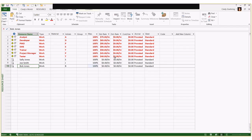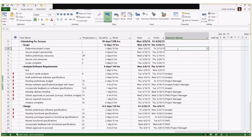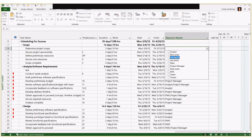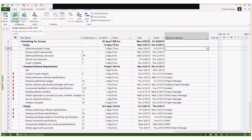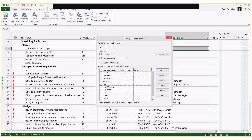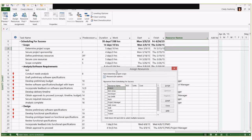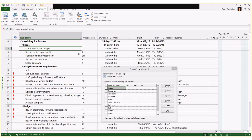You can track cost rates and even different calendars for your resources if needed. Once resources are entered in the Resource Sheet, go back to your Gantt Chart view. You could use the resource names column to check off resources, but I think there's a more efficient way. Go to the Resource ribbon and click Assign Resources — this dialog box allows you to assign one or more resources to one or more tasks at the same time.